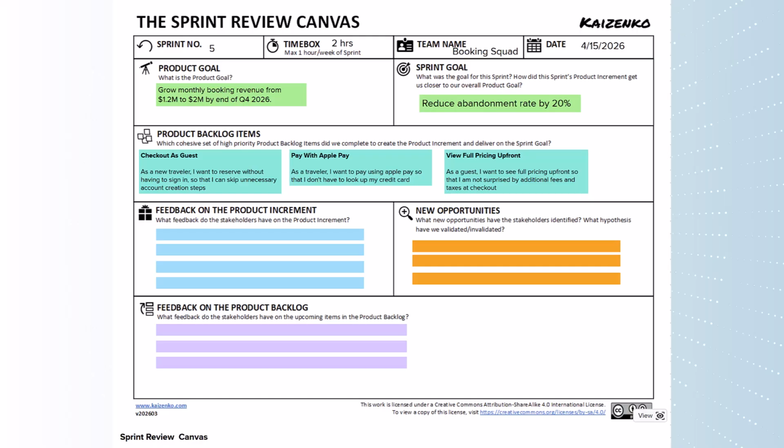Remember, these are things we established in sprint planning, and that is what we need to go over in the sprint review. We do not need to go into the tasks, as that is a bit too granular for the stakeholders to care about. The 3 stories we worked on resulted in an increment. The increment is not a slideshow or a presentation. It's a working, usable, useful product that the stakeholders can see, use, try out, and give us feedback on.